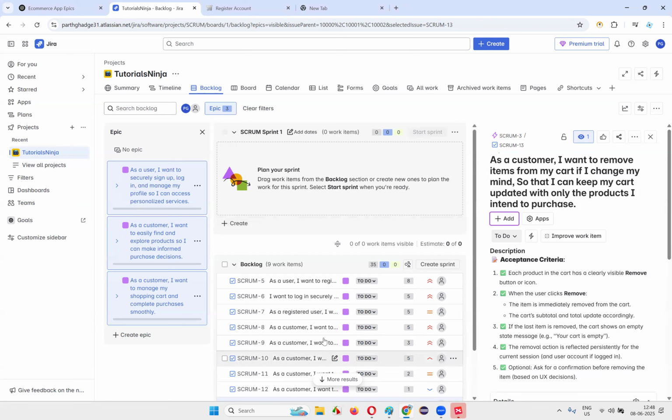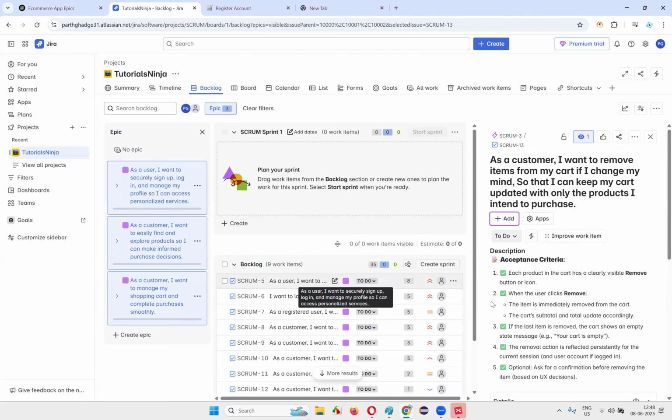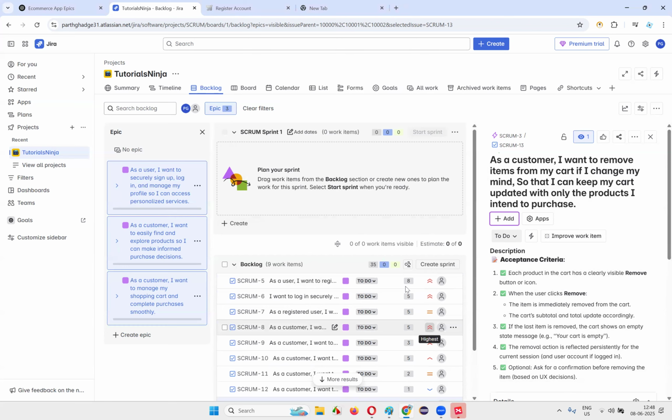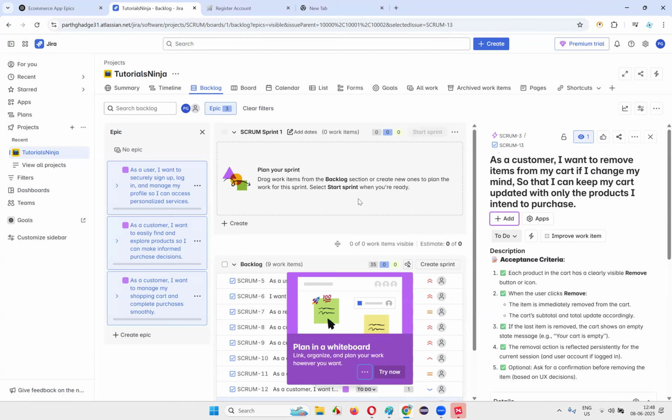During that process, the product owner will say that for this particular sprint, high priority things are there, 1, 2, 3, 4, you see, and calculations will be done. 8 plus 5 is 13, almost nearly 20 story points. Let's assume that 20 story points can be put here.